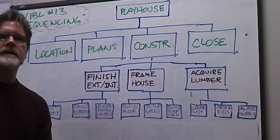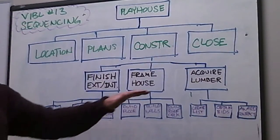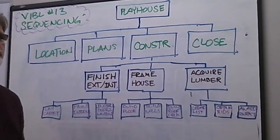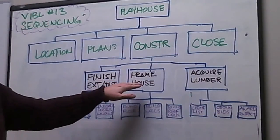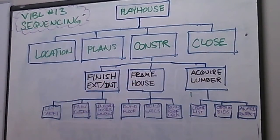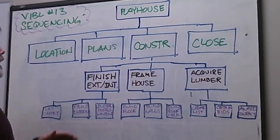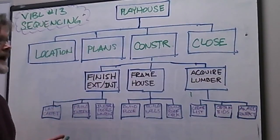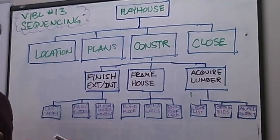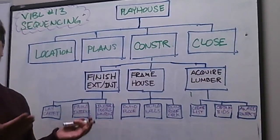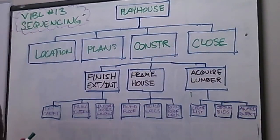In this particular case, the common logic is that you would need to acquire the lumber first before you could actually have the carpenters frame and build the house. And once they have framed and built the house, then you're able to go onto the exterior and interior of your playhouse and be able to finish it. That is to lay the carpet, to paint the walls and to install those doors and windows.